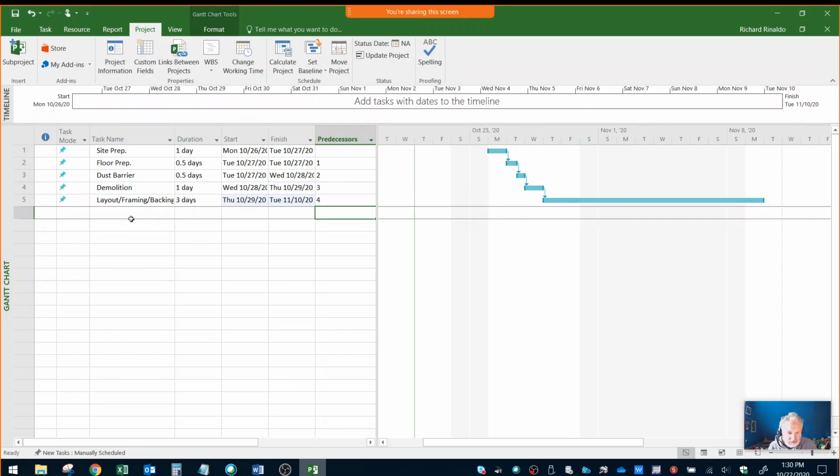Okay, so then that explains to me I can put in gaps. So if you're doing one for, let's say, a capstone project, you may put in, like I did for the other one, study week unavailable. Okay, so then I got new subfloor. And new subfloor is 2 days, and it's dependent upon 5. So I just keep rolling along, and then I got new subfloor install,